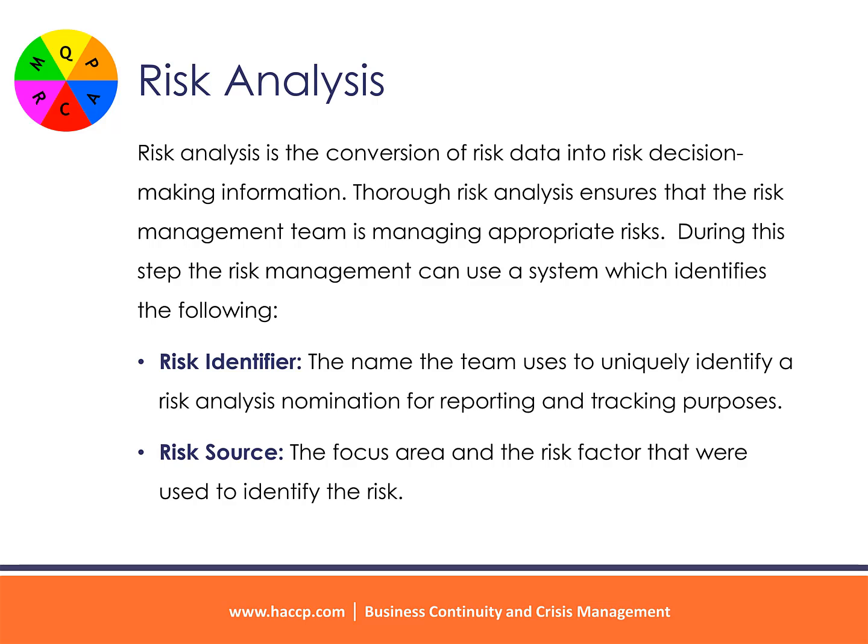Thorough risk analysis ensures that the risk management team is managing appropriate risks. During this step, the risk management team can use a system which identifies the following: risk identifier, the name the team uses to uniquely identify a risk analysis nomination for reporting and tracking purposes. Risk source, the focus area and the risk factor that were used to identify the risk.